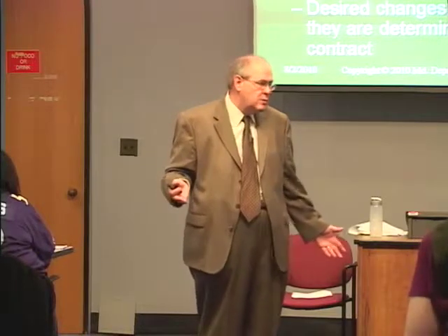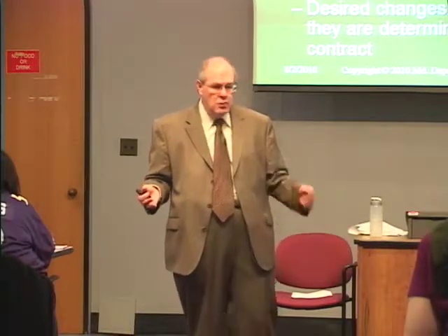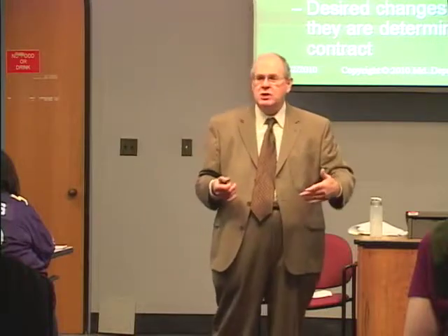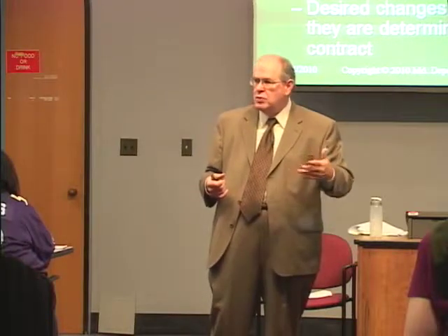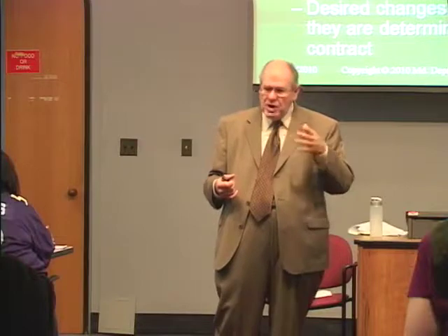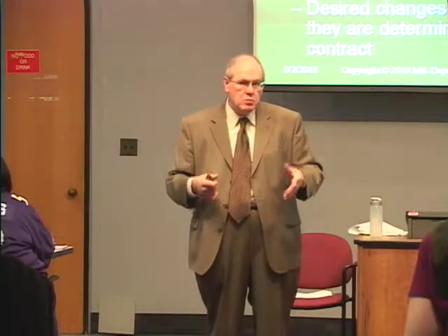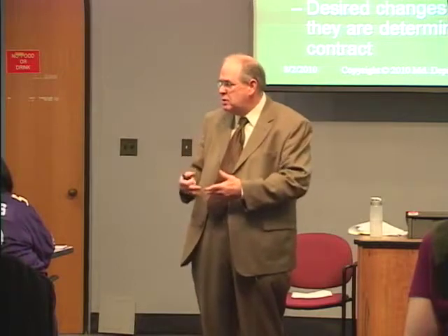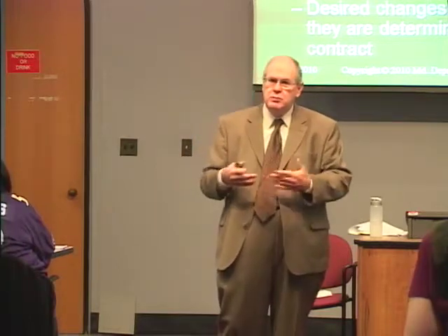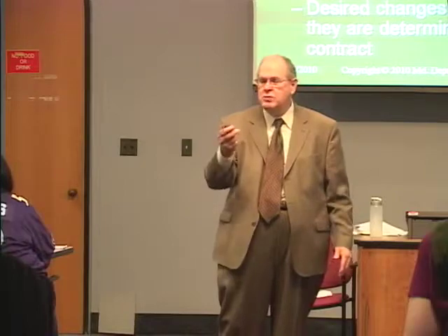And sometimes that's a hard decision, but what we're saying is if you specifically anticipated something and wrote into the contract to begin with even the possibility that you may want to implement something in the future, then it's in scope because it's written into the specifications. So planning can perhaps allow you to do something later.